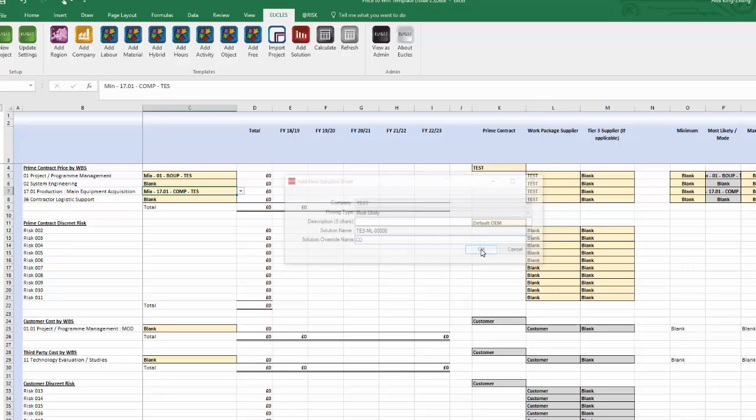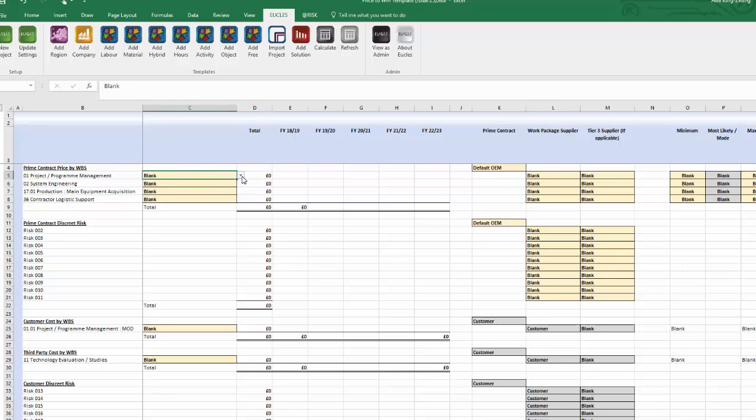Okay, because we like to encourage the 3-point estimating, I'm going to also set up a most likely tab here, and then we'll do a maximum one. But in the drop-down list you saw on the left, that's where all these different options would appear. So if I did more estimates of the radar that we're just looking at, they'd all be selectable on row 7 there. So then we're going to hit calculate once I've finished adding all of these in. And we're going to see a lot of information on this tab. It's actually at the bottom of the tab. You can't see it at the moment.